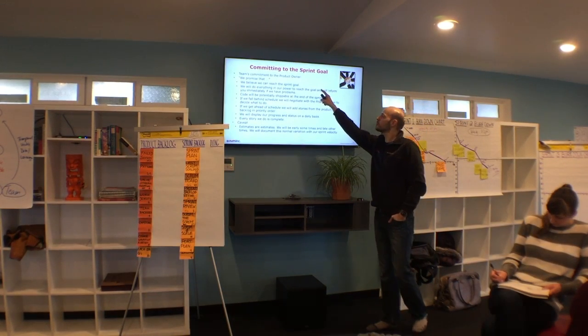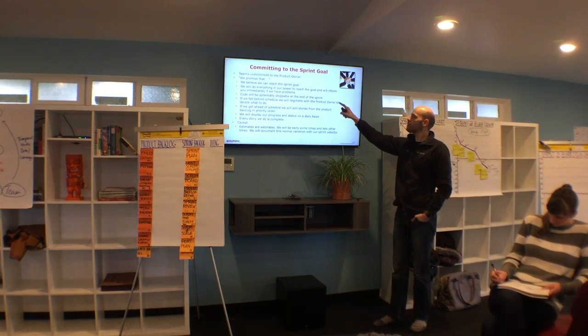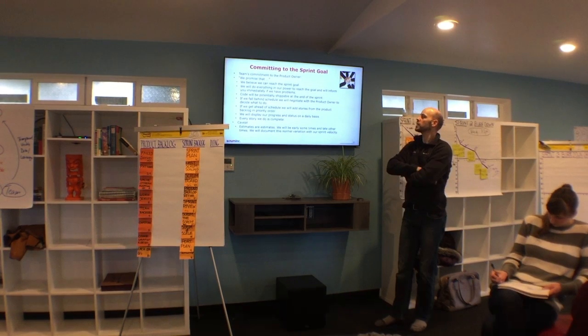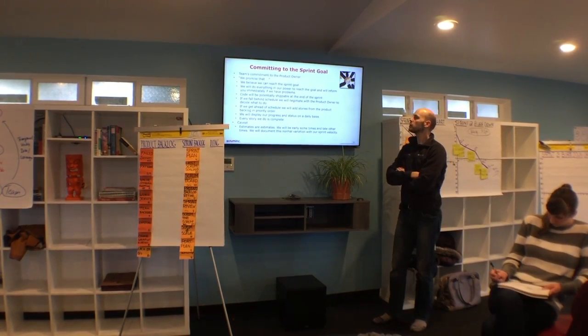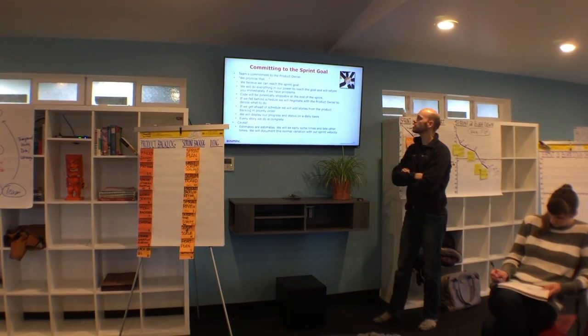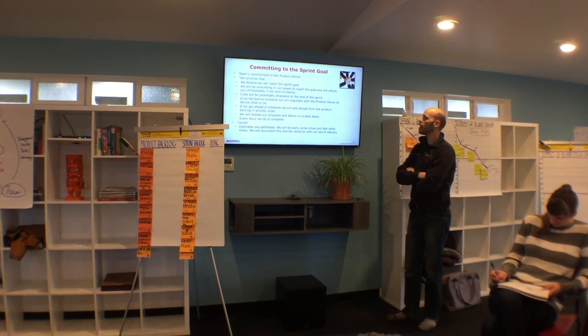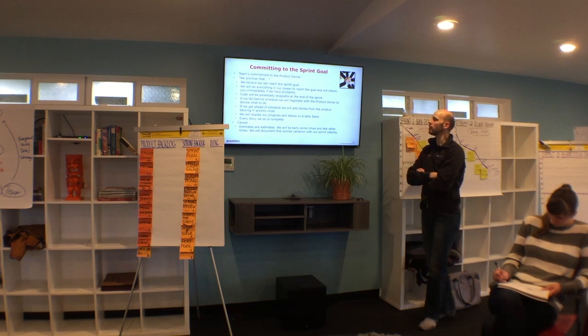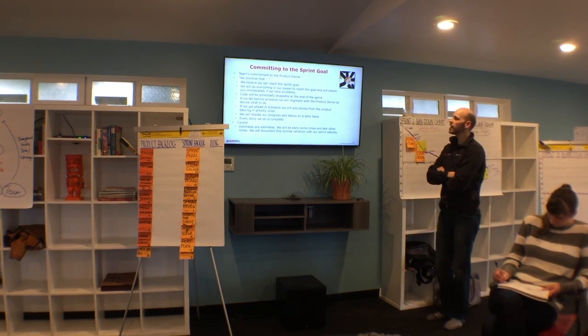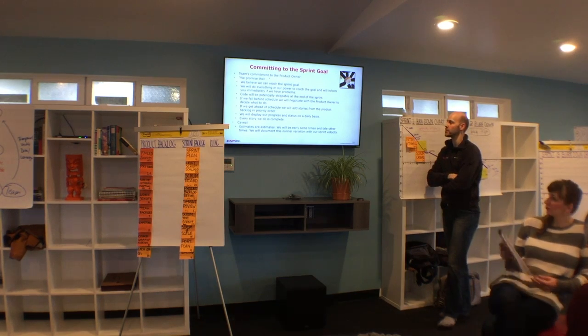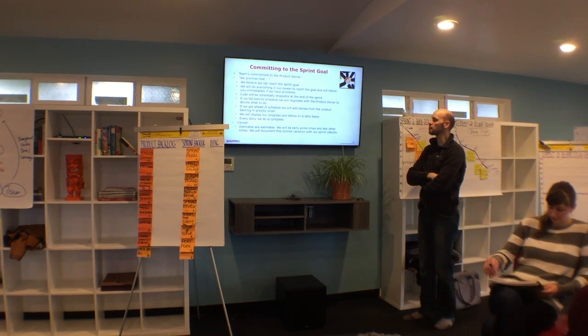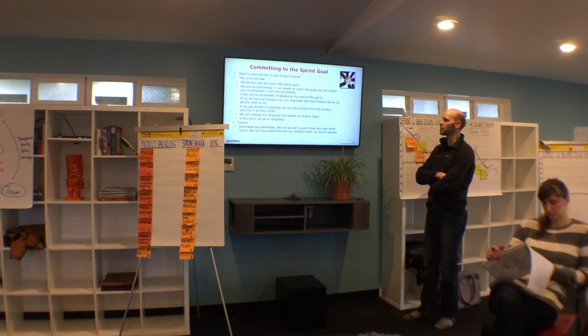The team's commitment to the product owner is, we promise that we believe we can reach the sprint goal. We will do everything in our power to reach the goal and will inform you immediately if we have problems. Our product will be potentially shippable at the end of the sprint. If we fall behind schedule, we will negotiate with the product owner to decide what to do. If we get ahead of schedule, we will add stories from the product backlog in priority order.